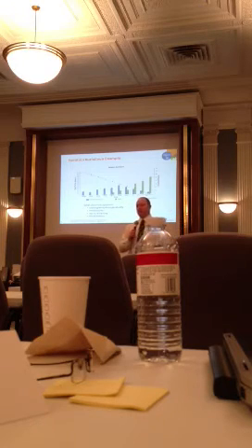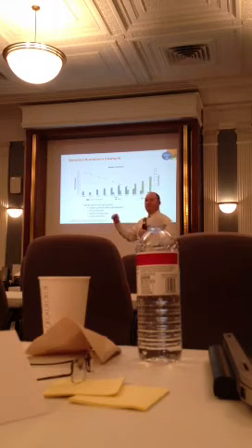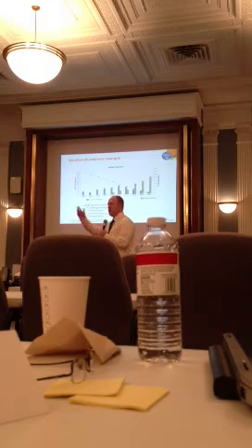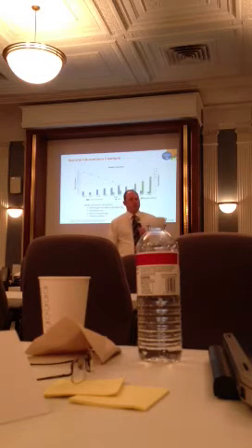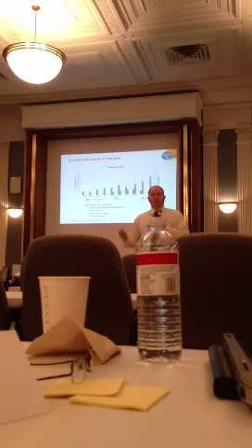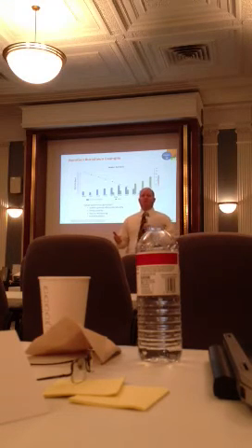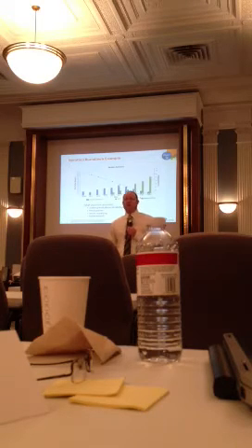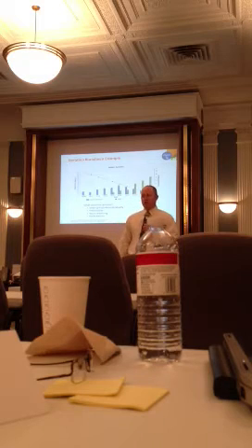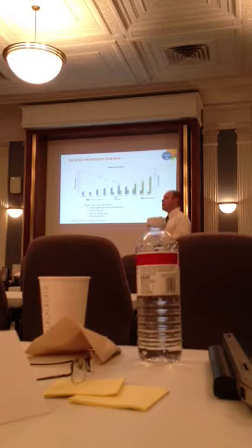Not so good. Because really what that means to me is we only had 50 hours worth of tasks out of the 340 that we ultimately delivered. We had only broken down roughly 1/7 of the scope of the user stories that we committed to delivering in that iteration. You're really leaving yourself open to hitting marshmallows when you've only broken down 1/7 of your overall scope into tasks, right?